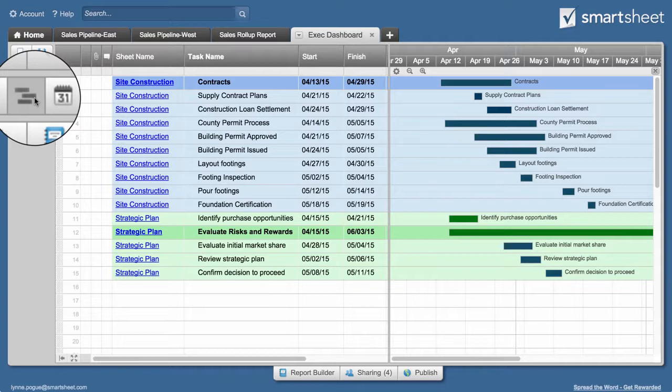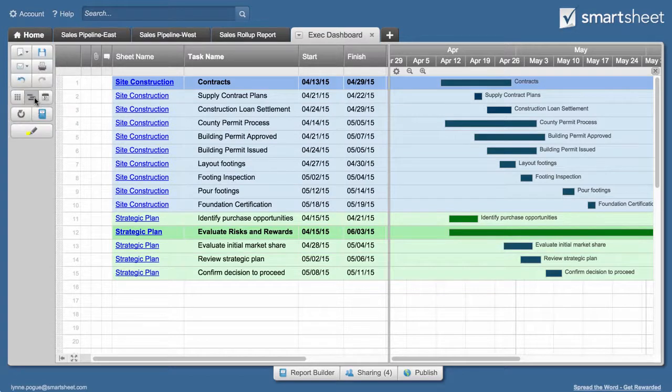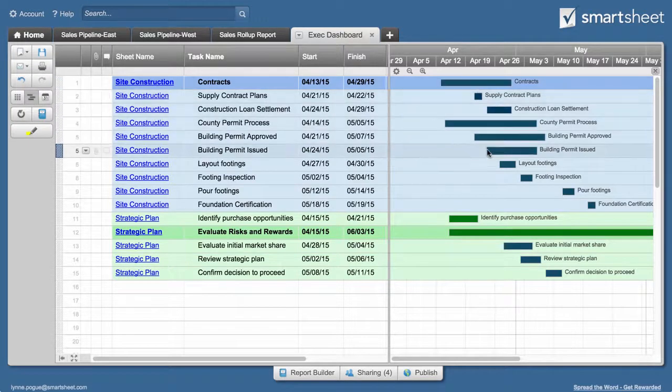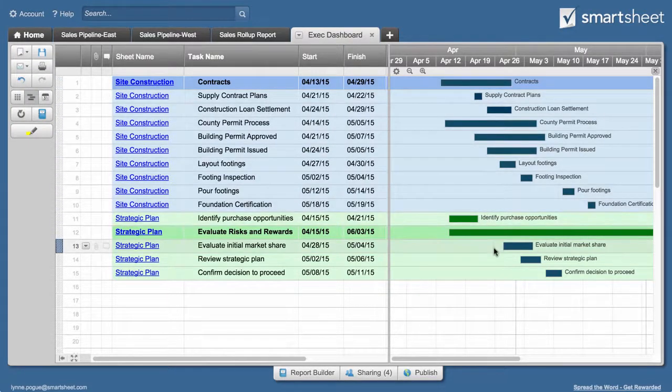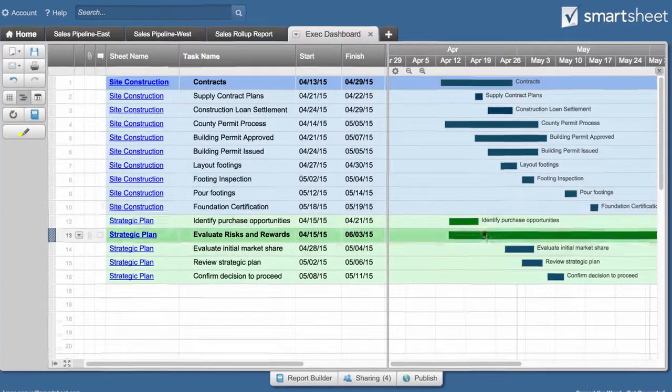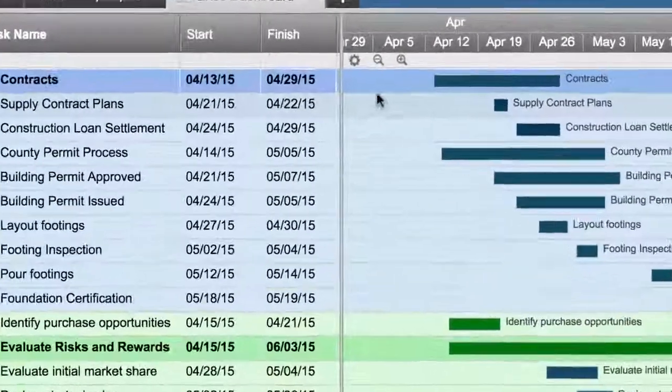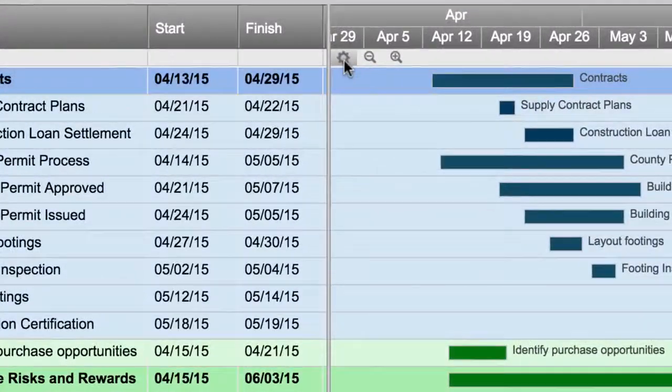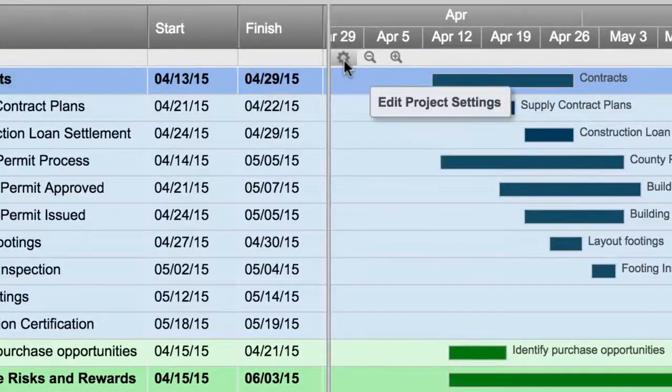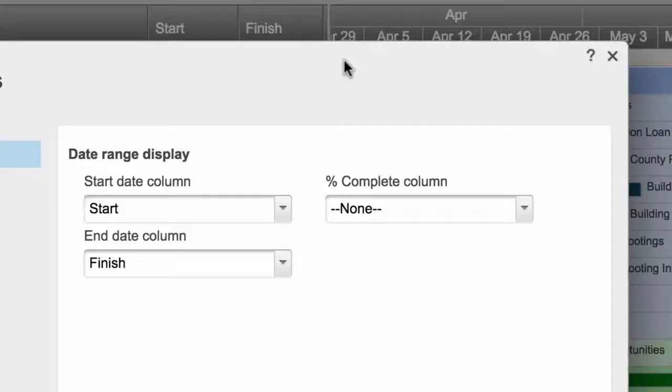To add a Gantt chart, the underlying sheets in your report must contain at least two date columns. You can specify which columns to use for the start and finish date in project settings.